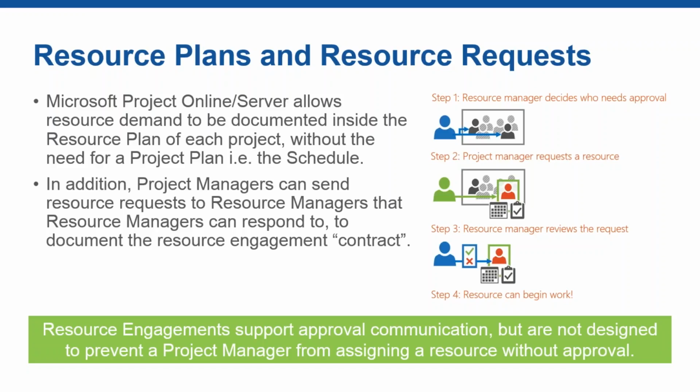We actually have the ability in Microsoft Project Online to define the high-level resource requirements before you even create a schedule. That's what we call a resource plan. Now, if you have used the Microsoft platform in the past, you may have heard about resource plans before. In the previous versions, that was through the web interface, where you have an Excel lookalike view through which you can enter the demand, if you will.